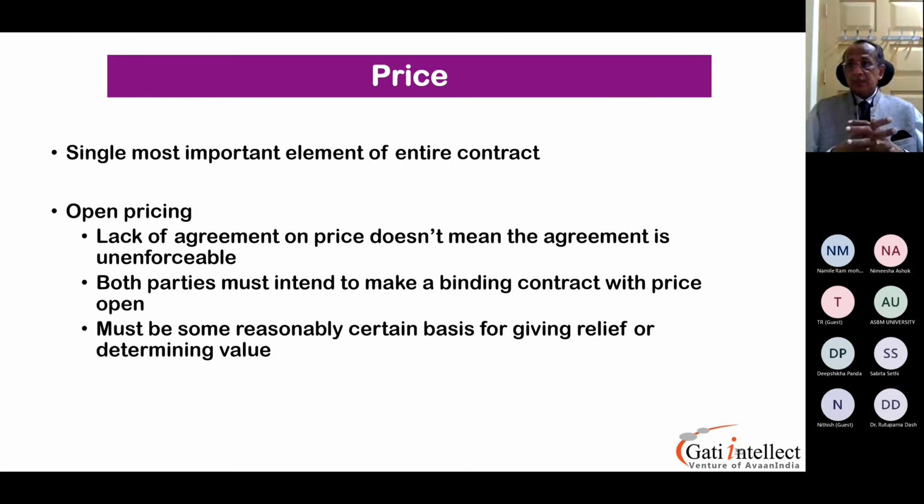So what they do is, in a cost-based agreement contract between the buyer and the seller, they have a general agreement as to what will be the terms, okay? The seller will say, yes, I will provide you as per cost, but then please accept my terms of adding 15 to 20%, depending on the circumstances.